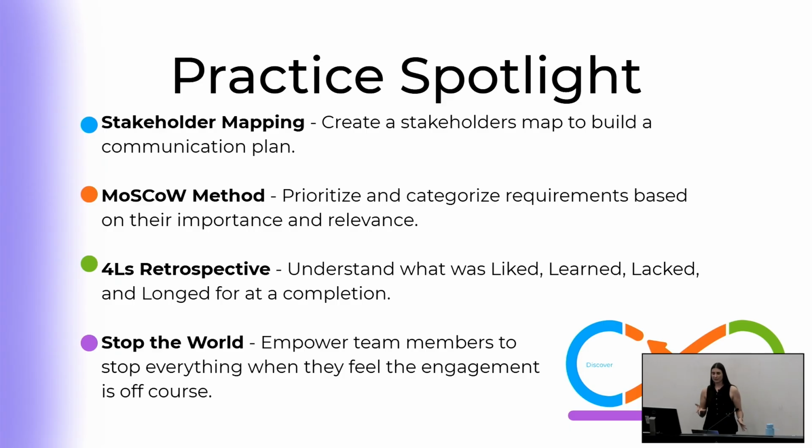So what this practice involves is you create a little axis, a little graph, and there's a photo of that on the online stakeholder mapping practice on OPL as well. And you put power on one axis and interest on the other. And then you put all the people that are involved onto that, depending on their power and their interest. And then from there, you see, okay, who do we need to consult? Who do we need to involve? Who just needs to stay informed?